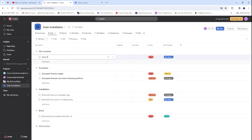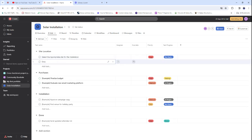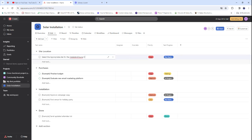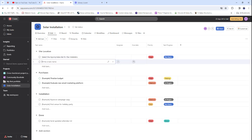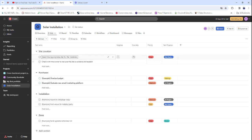Under Site Location, let's add tasks. The first task is: 'Select the appropriate site for the installation.' Then we add another task: 'Check with the owner to confirm the site is suitable' — basically telling the client that this location gets the most sun exposure.